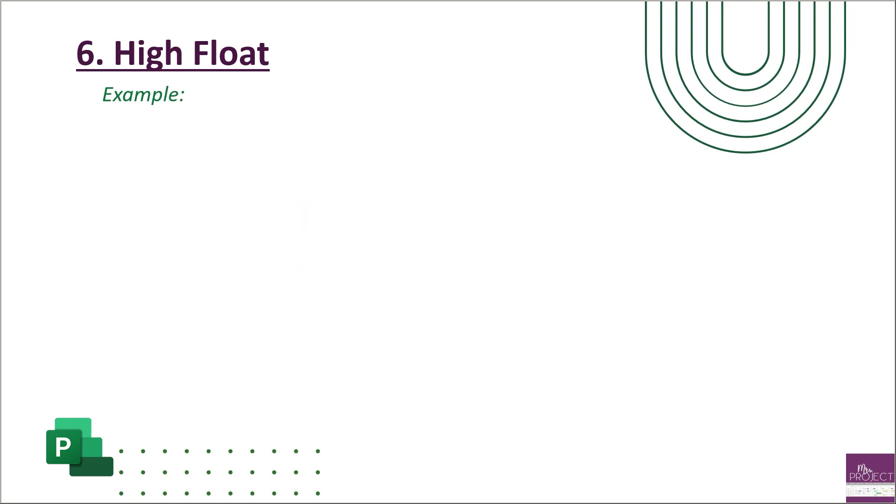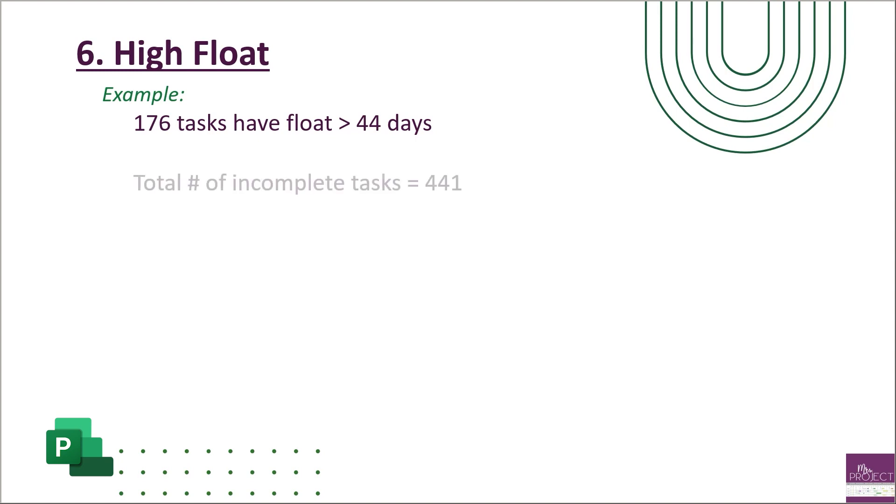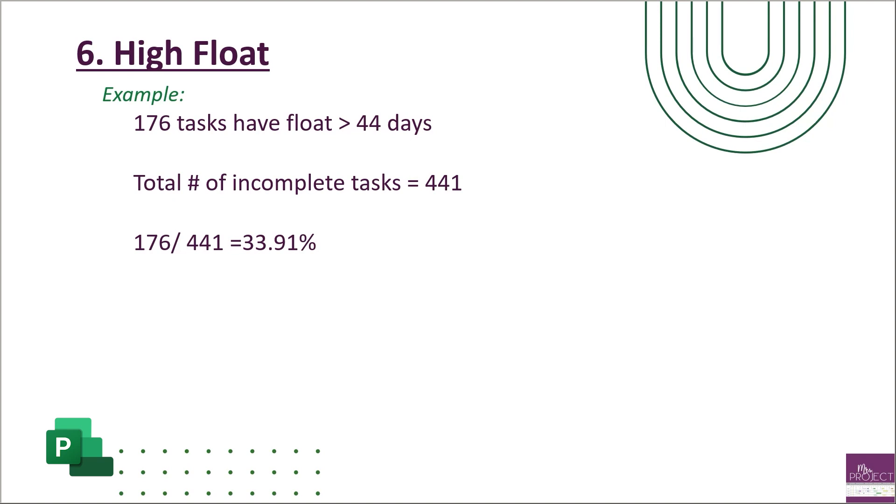So an example of this: you have 176 tasks that have float that is greater than 44 days, and the amount of incomplete tasks you have is 441. So that's 176 divided by 441 is 33%, and that's over your margin. So you need to reduce that down and work to getting below the margin.